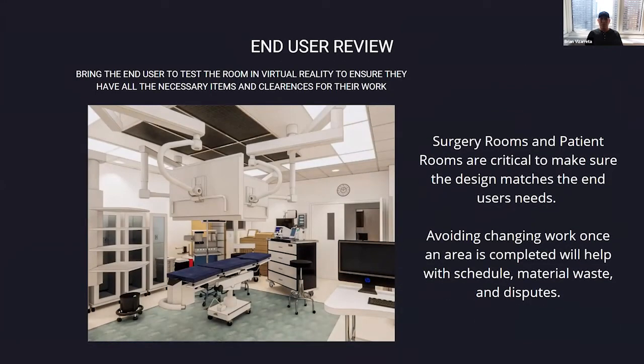Getting the end user review. If you work in the life sciences or hospital space, this is probably one of the easiest gimmes. It's going to be surgery rooms or patient rooms, where the actual end user, whoever is going to be spending 8 to 12 hours a day there, wants to make sure they can use virtual reality to check: can you access everything that you need within the space that you are standing?